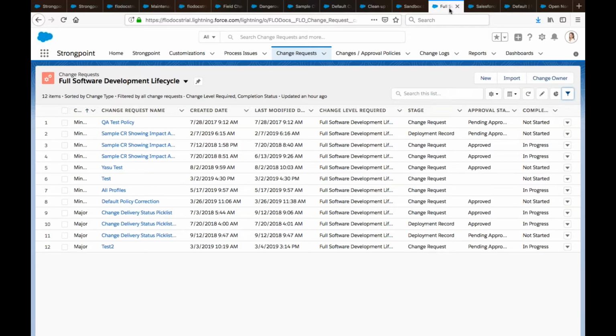Those things can be put through a lighter change cycle, and then more complex things go through a deeper change cycle. And for some of our customers, this is still the same group of people. It's just the same group of people where you're doing a lighter review of it because you already have the engine saying, this is not that complicated. You may still be sitting there going, is this a good idea? That's a different question. But what you're not doing is saying, okay, are we going to have time to do the regression against this?